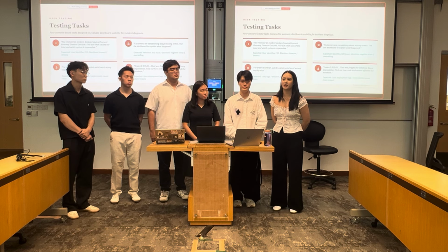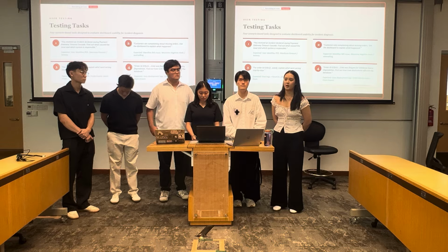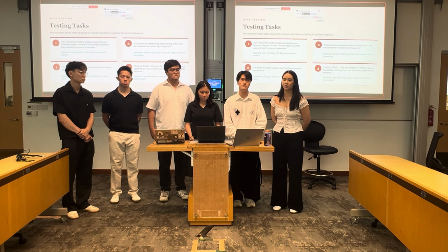We explained our timeline and communicated that, given it's this week now and we need a certain number of days to complete this, we would compromise by only doing the essentials, so that there is still additional output, which is what we have now for the scalability and our user testing. We didn't directly get to do an A/B test, but we used user testing instead, which was much more useful because we got more direct feedback and iterations to follow through.